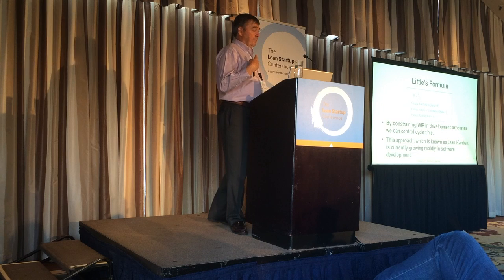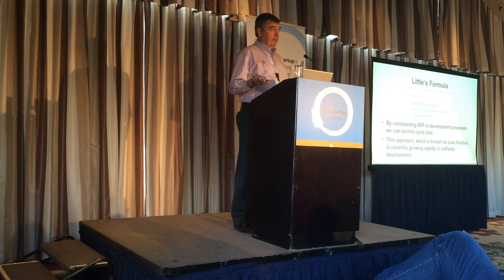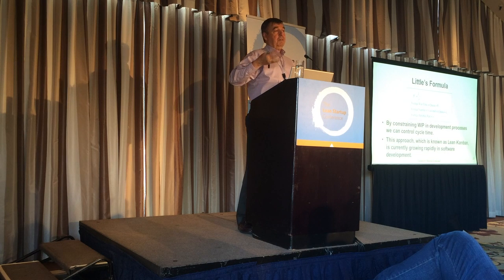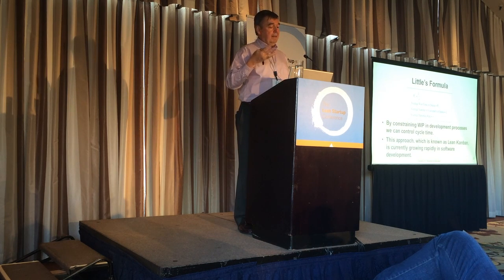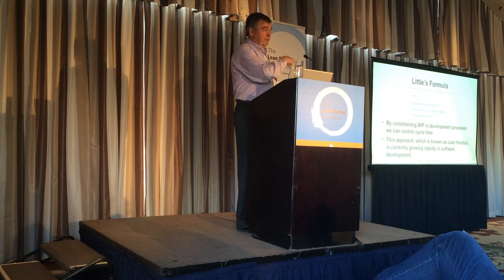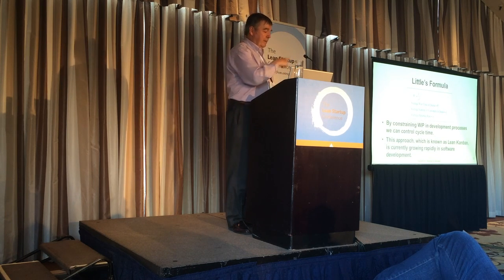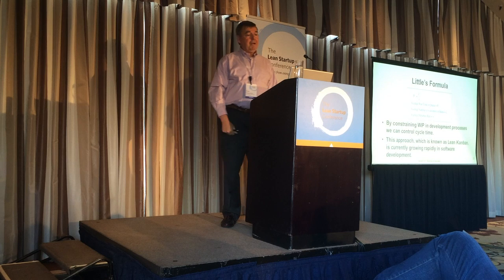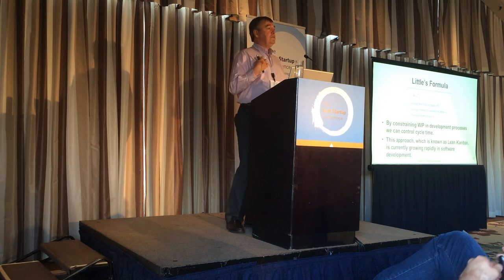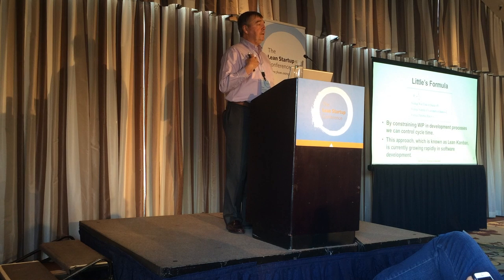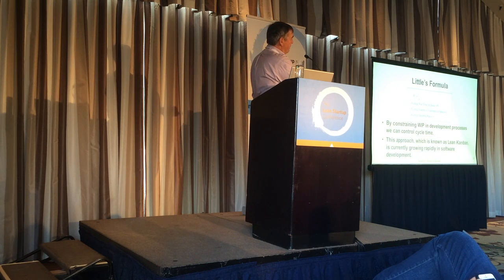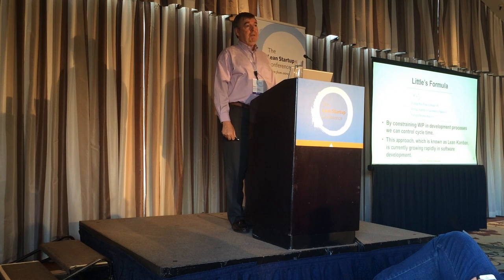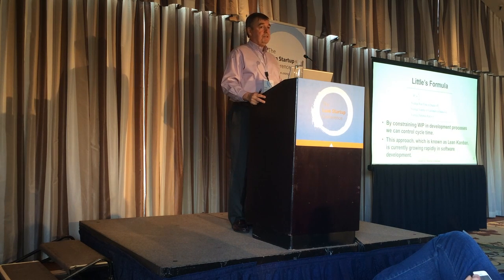In queuing theory, there's this famous formula called Little's formula. It relates the size of the queue with the departure rate and the waiting time. I'll use all the official formula letters here, so that you don't see something that might disagree with what you'd learned before. Wait time in the queue equals length of the queue divided by the departure rate. So you walk into Starbucks and you say, how long am I going to wait for my coffee? What's the length of the queue? There's 20 people in front of me. How fast are they serving people? 4 people a minute, 5-minute wait time in the process. It's as simple as that.